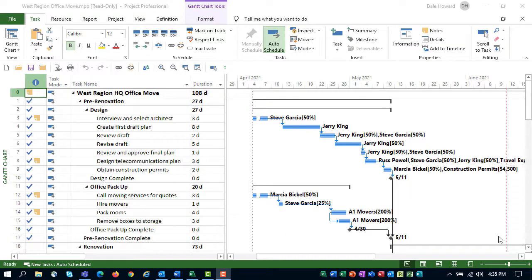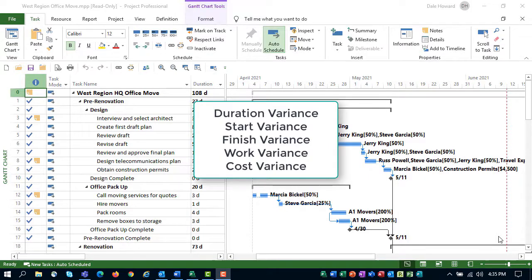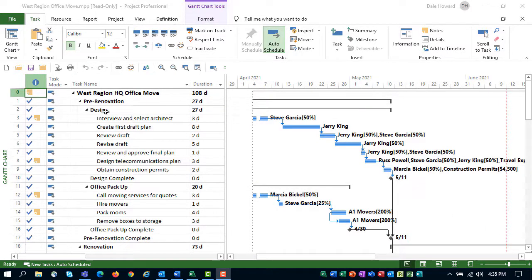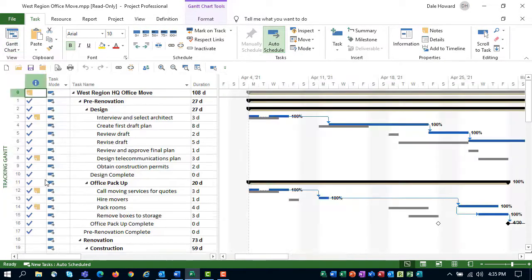In Microsoft Project, you can analyze up to five types of variance. These variance types are duration variance, start variance, finish variance, work variance, and cost variance. To analyze start and finish variance, you can apply the tracking Gantt view.